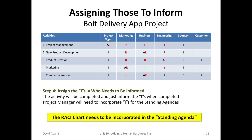And the last letter to be assigned is I — who needs to be informed? The activity will be completed and you simply inform the I's when it's done. Again, the project manager will need to incorporate I's into the standing agendas.